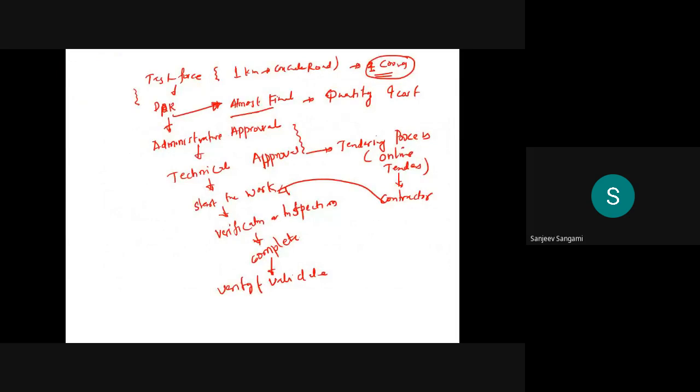In almost all this process, proper care has to be taken in preparing the DPRs, because if you go wrong at the design stage, these people will blindly follow it till the end. Most of the time, this is like a Bible for each of the contractors. Once this DPR is approved and assigned by the section officers or the engineers from any of the government departments, the contractor simply has to follow it, even if it is wrong.